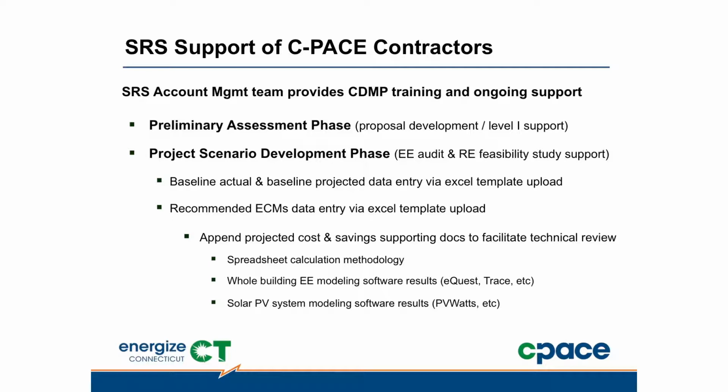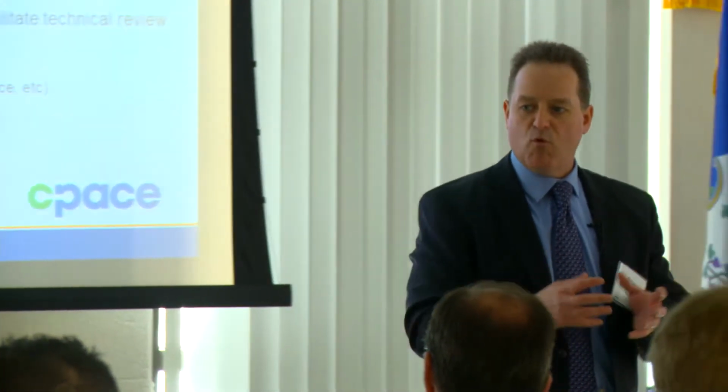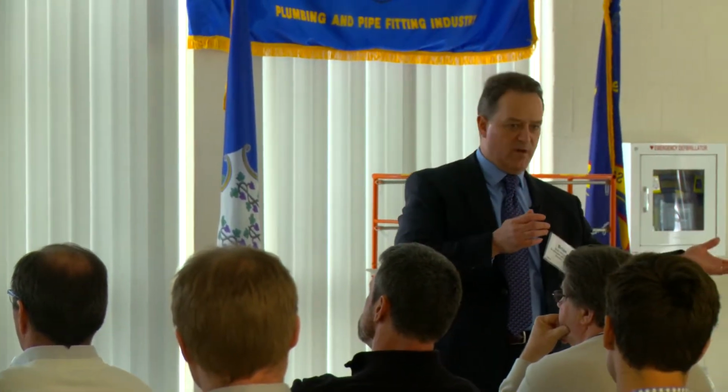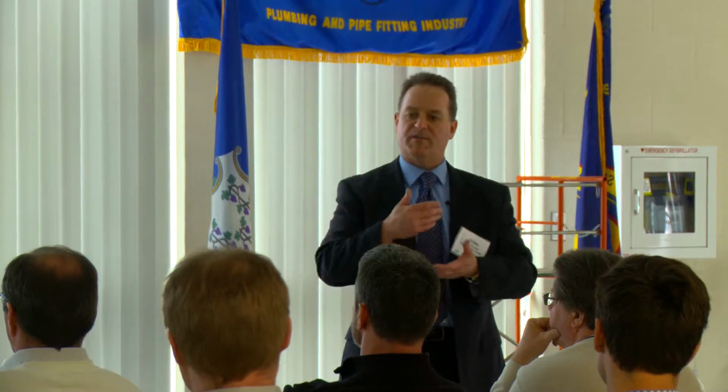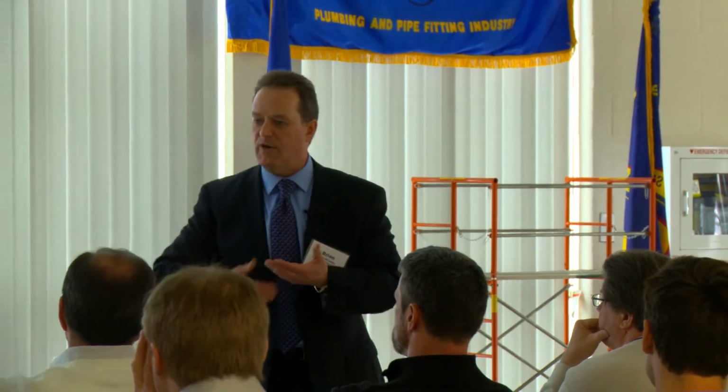It's simply that the outputs of using those tools, namely the projected savings estimates, are going to become inputs into the CDMP, and that backup or supporting data that's supporting your calculations needs to be appended so that when Tom or Anthony, as part of the technical review team, are reviewing those estimates, they can get comfortable, right, that they meet technical rigor.